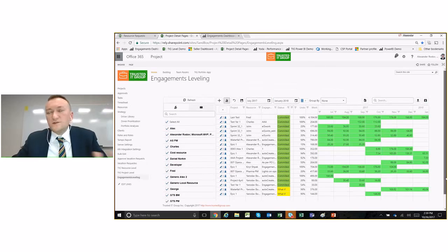So you can use different tools, different analytics, in terms of what is the best way, either to manually move it a little bit, or reassign it to someone else and then move it a little bit, or reassign it to someone else, move it, and then apply the auto leveling, and have these options in your possession to balance the portfolio.